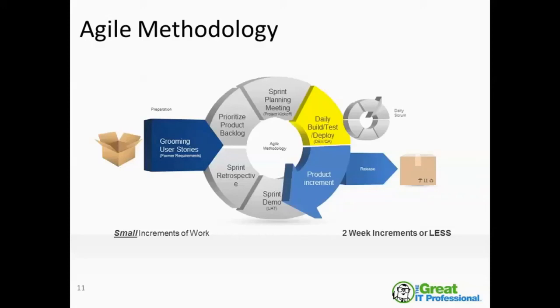You're doing a product implement. And when you're done, there's always some kind of demo and then a retrospective. I think the key thing here is it's small incremental work. It's usually two weeks or less, and you're producing what I call production-ready solutions. It doesn't mean they get released into production, but production-ready.